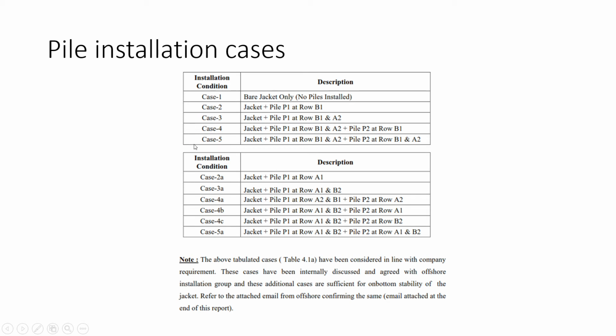Whatever cases I have followed, you have to consider only those. Cases which are not considered, you should not consider like that. You have to put a note. See, the above tabulated cases have been considered in line with the company requirements. These cases have been internally discussed and agreed with the offshore installation group, and these cases are sufficient for on-bottom stability of the jacket. Refer to the attached email for the offshore confirmation.